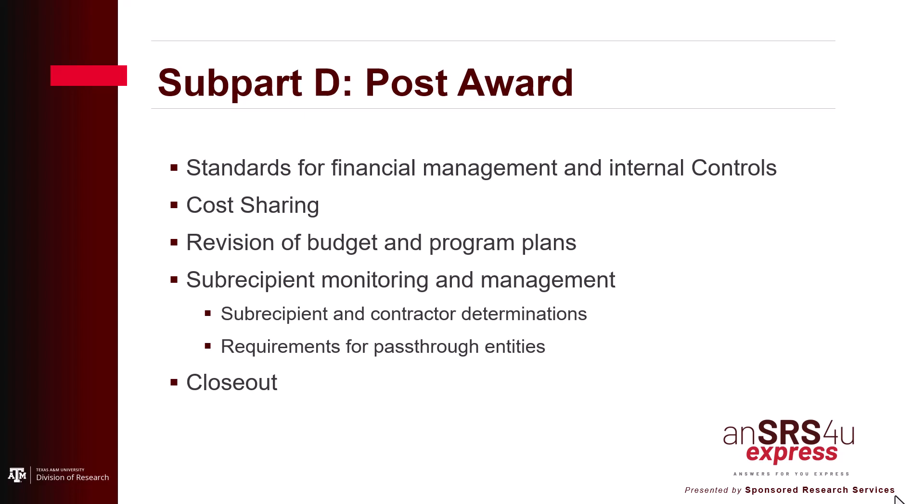Cost sharing is a portion of the federal award that is not paid by federal funds or contributions. This section lists the criteria that items considered for cost sharing must meet. Recipients are required to report deviations from project scope or objectives and in some cases request prior approval from the federal awarding agencies for budget and program plan revisions. Subrecipient monitoring provides the recipient guidance in making case-by-case determinations whether each agreement made for the disbursement of federal program funds casts the party receiving funds in the role of a subrecipient or a contractor.